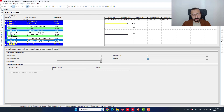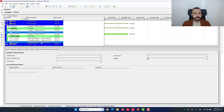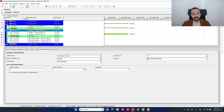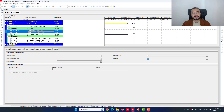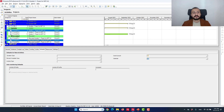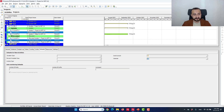For the second window, I'm going to compare update number two as beginning of period with bifurcated update number three. When you are doing the analysis, you also want to compare the update itself with the bifurcated version. So in this window, I compare update number one with bifurcated update number two — whereas in the 3.3, I would compare update number one with update number two. When I perform the analysis, I also want to compare the bifurcated update number two with update two itself to review the changes.